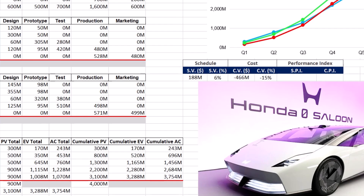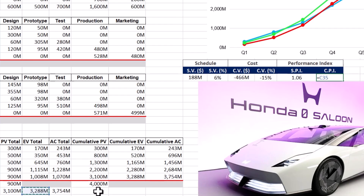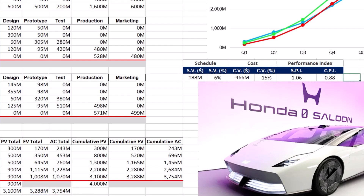Schedule performance index or SPI and cost performance index or CPI are crucial metrics in project management for measuring efficiency and early detection of issues. SPI measures schedule efficiency by dividing the earned value or EV by the planned value. CPI measures cost efficiency by dividing earned value by actual cost or AC. A CPI of less than 1 means the project is over budget.